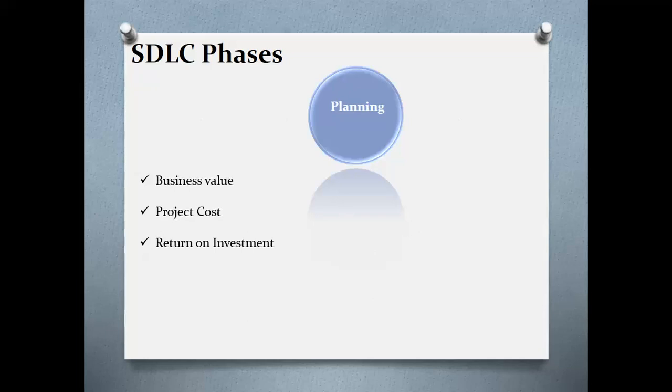Next, a project plan is created detailing the entire schedule of the project. Resources like financial, hardware, software, manpower, and infrastructure are identified and documented. Once the project plan is approved by the project top management, the project is kicked off.